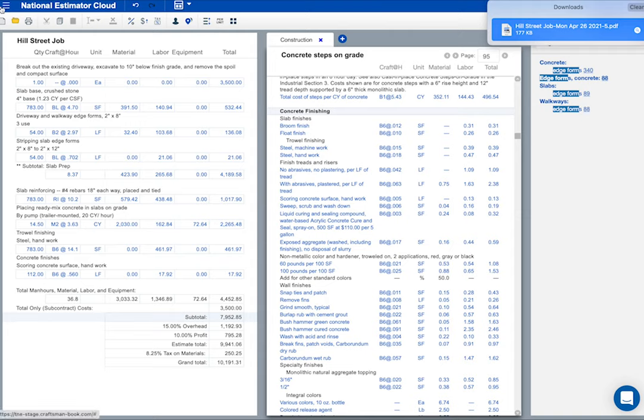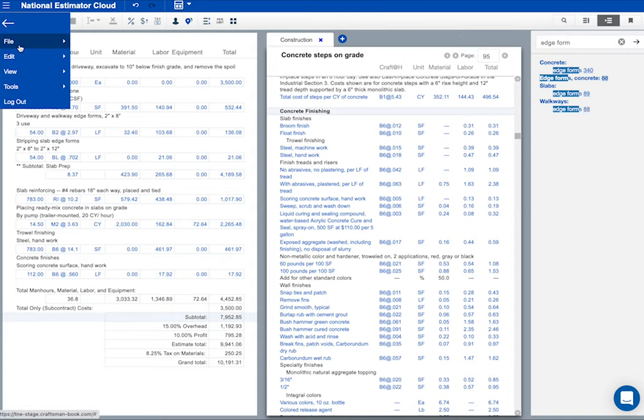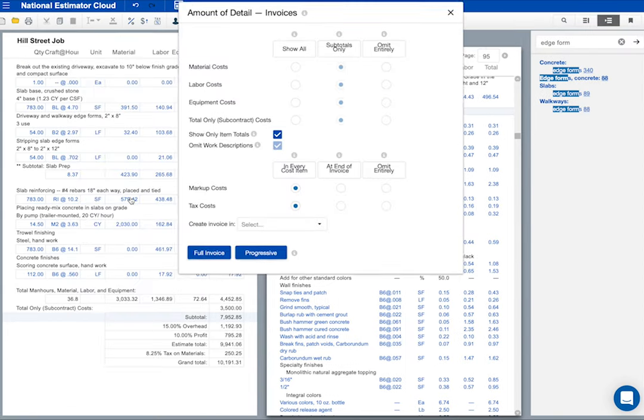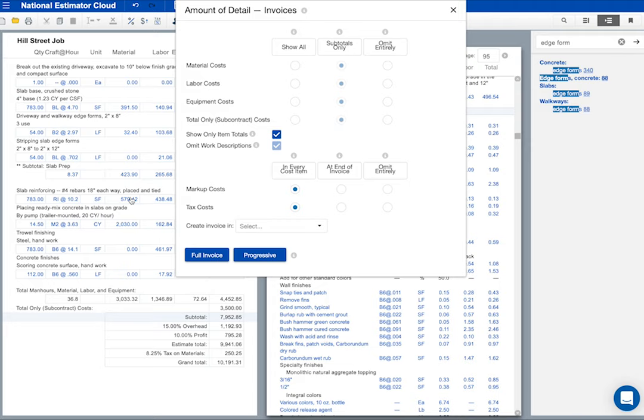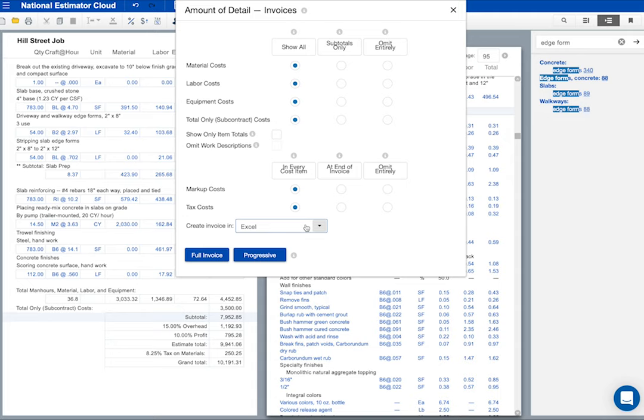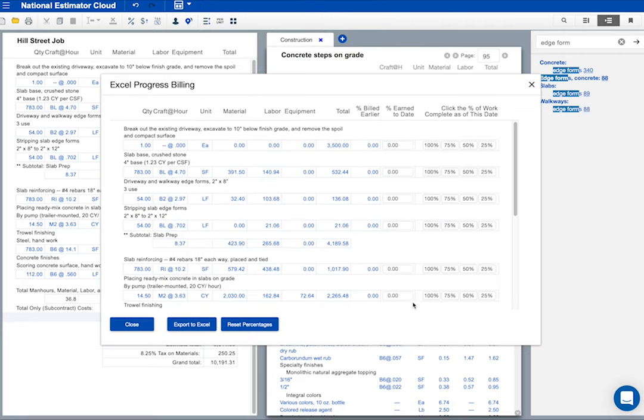When it comes time to collect for this job, National Estimator will print the invoice. Again, my invoice doesn't have to show every detail in the estimate. I'm going to leave these options alone. You could export the invoice to QuickBooks if that's your choice. But I'm going to create this invoice in Excel. And it's going to be a progress invoice. Here's where I check off what was done each pay period.